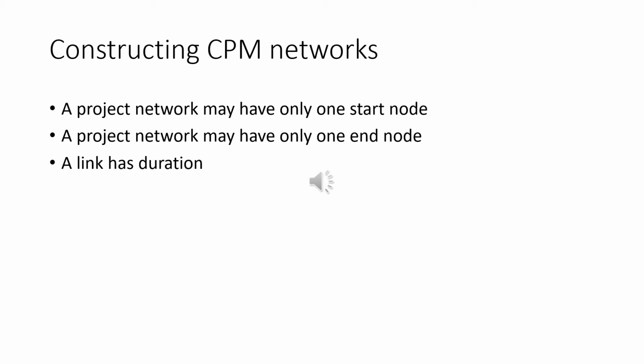The network drawing merely represents the logic of the project. That means the rules governing the order in which the activities are to be carried out. Since a link represents an activity or a process to be executed, it takes time to execute, which means that a link has a duration.